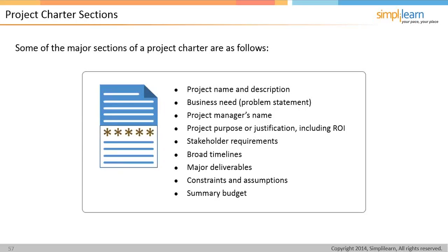Now, I would recommend, if you don't have this already, to put both the tangible or measurable benefits. If we get from increasing something or decreasing something, if we get from here to there, it's worth this much money. The marginal value for each, let's say 1% improvement in this process means that much money to the organization. There are also some other benefits that we anticipate seeing. We're not sure how to measure them today, or maybe we won't be able to measure them, but here are some things that we're going to be looking at. Maybe finding a measure for customer or employee satisfaction is out of scope, and so you're going to